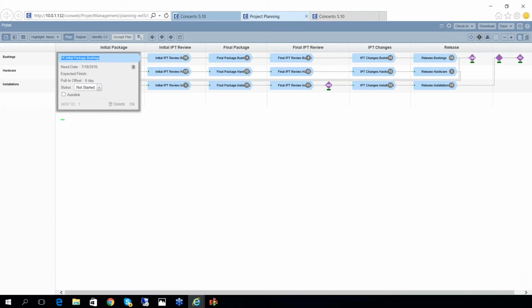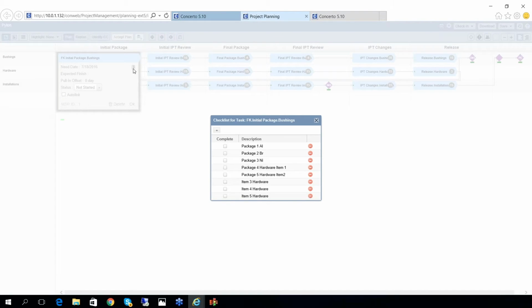So instead of managing multiple lists, multiple inputs that integrate or feed into different points in the project plan, we are aggregating all those inputs into this one full kit point. What we are saying is don't start the first phase until all these inputs are there, at least from a planning perspective.